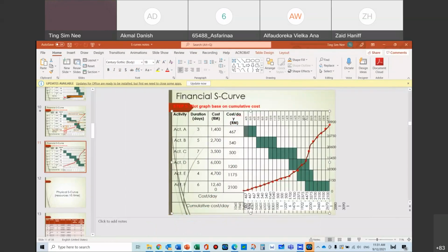Let's say you've done your PV. Now we embark onto the EV technique, month by month. Imagine month 1, month 2, month 3, this is talking about 20 months here. Let's say in month 8, I want to do monitoring. Monitoring is done every month. When you talk to the client, monitoring is every month. You need to submit your work progress report every month.